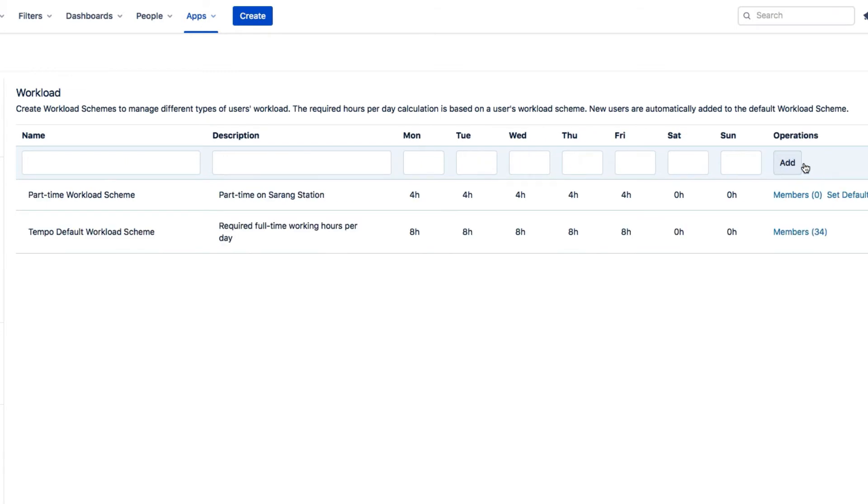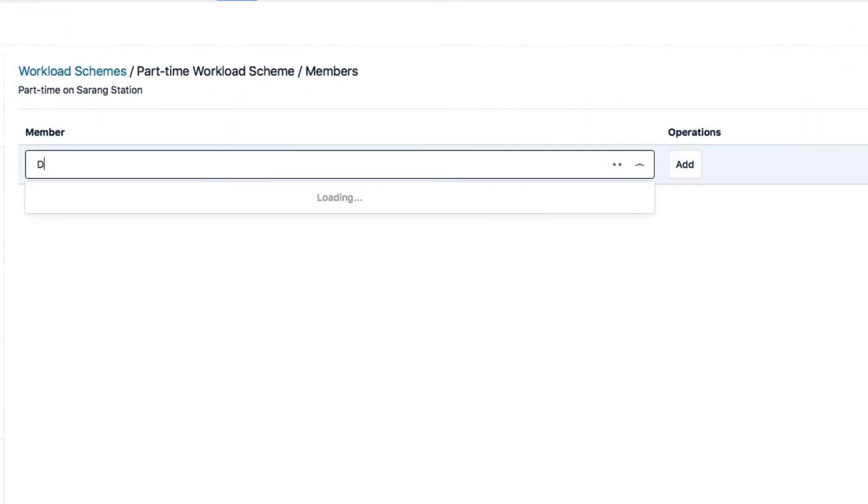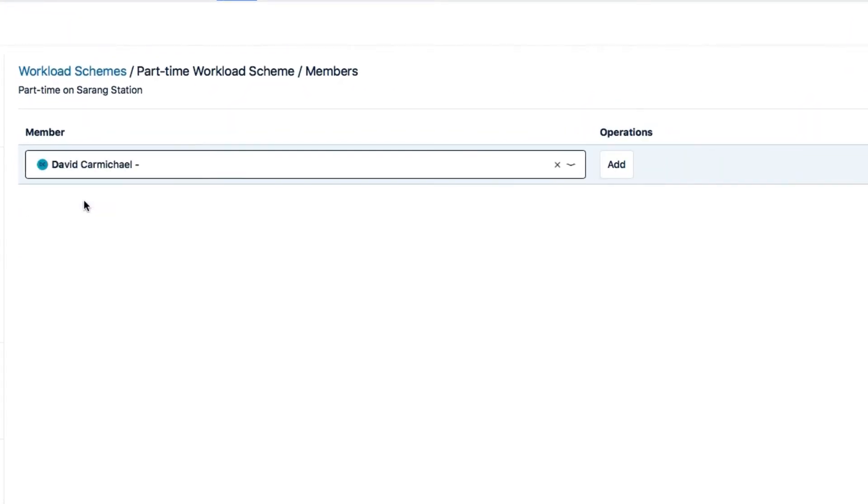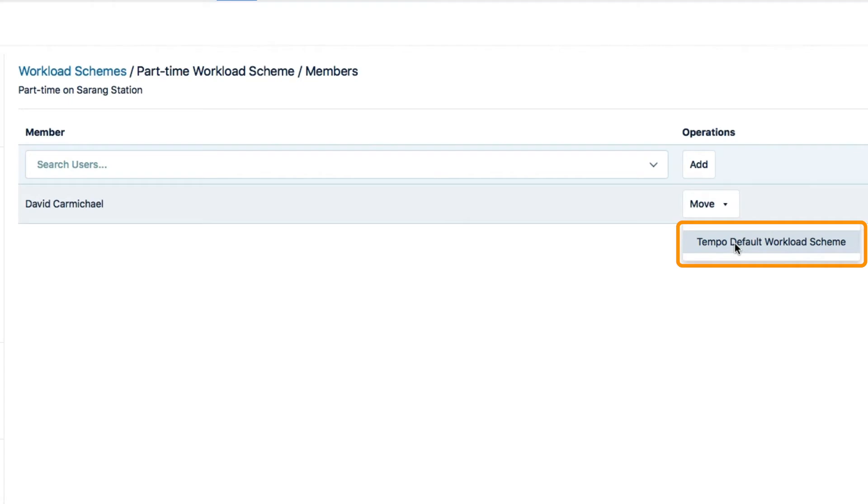Now I need to add the part-time employees to this scheme. So I click Members beside it, and enter David's name. And then click Add. When I do this, it removes him from the Tempo Default Workload Scheme, since an employee can only be in one scheme at a time.